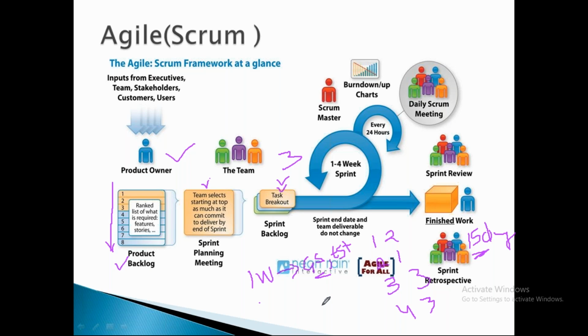So sprint plan: one sprint is 15 days. It means the first week is all the estimation part and test case writing. In the second week, they may start the development. Once the development is over, in the third week you are completely doing testing, the execution part, and defect tracking, reporting. And by the end of the third week, all the demo part also should be ready. That means all these 10 user stories should be ready.